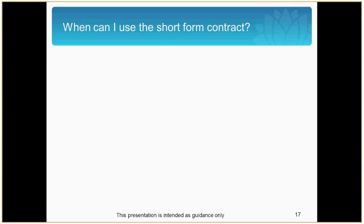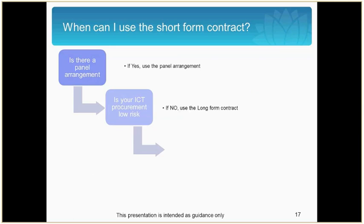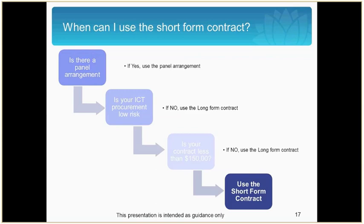There is a distinction between a short form and a long form contract. The first question you need to ask yourself is: is there a panel arrangement for this ICT service? If there is, you must use the panel arrangement. If there isn't a panel arrangement, you need to conduct a risk assessment to find out whether your procurement is low or high risk. If it's high risk, you need to use the long form contract. But if it's low risk, you need to assess that the entire value of the contract is less than $150,000. If it isn't, you must use the long form contract. But if your procurement is low risk and less than $150,000, use the short form contract.